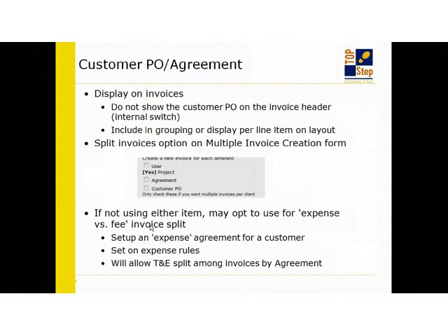Customer POs and agreements. This is a functionality many people are using, the customer POs, maybe not so much the agreements. It's more of a statement of work or an expected plan of effort or cost. But the customer PO functionality in OpenAir allows you to basically create that commitment from the customer saying, I will pay you a certain amount of money based on this engagement. And many customers, especially in the European area, do issue customer POs as part of normal business practice. So great, you enter a customer PO in the system. What else can you do with it?